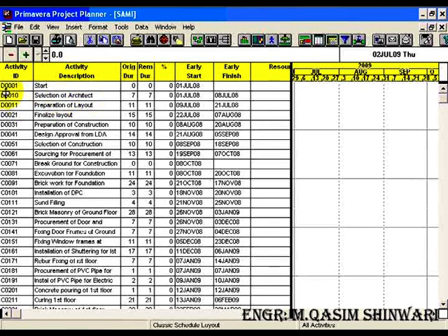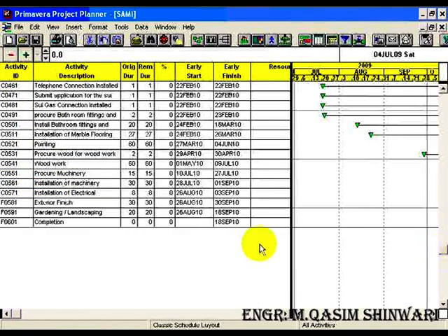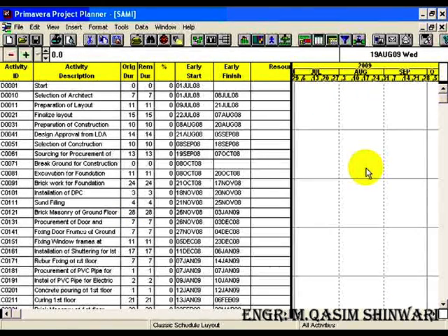You can easily detect that D stands for design phase, C stands for construction phase, and F is for finishing phase. And moreover, we will also define whether an activity is the responsibility of the owner, the architect, or the contractor. So let me define some WBS codes.